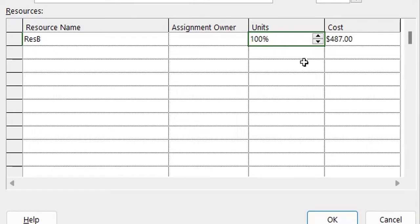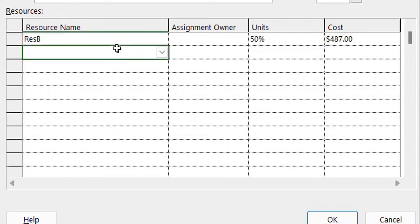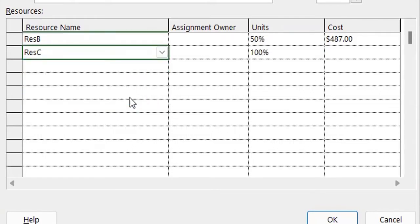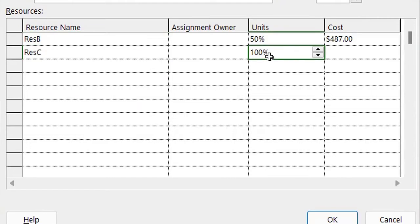So I reduce it to 50 percent and I assign Resource C as well as 50 percent. So they will both be sharing half time of doing this task.